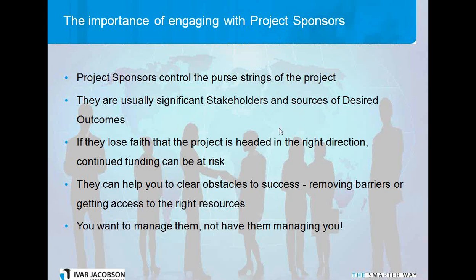So if that happens, especially if your project spans multiple years, your funding can be at risk. This is another reason why you want to make sure that the project sponsor is happy and thinks the project is going well, because if they don't approve the funding for the next year, you could end up with significant cuts to your project or perhaps cancellation entirely.